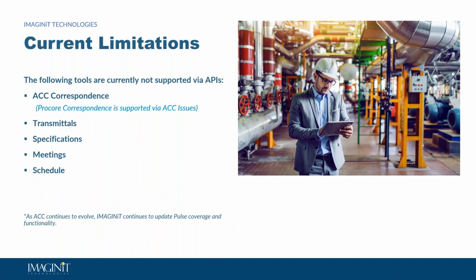If your general contractor is open to sharing those files with you, then you can import them directly into ACC, and as you receive new copies of the schedule, it's native to ACC to just import over the top, and then you get versioning and comparisons within the schedule view of the Autodesk Construction Cloud. One that I don't have listed here are forms.